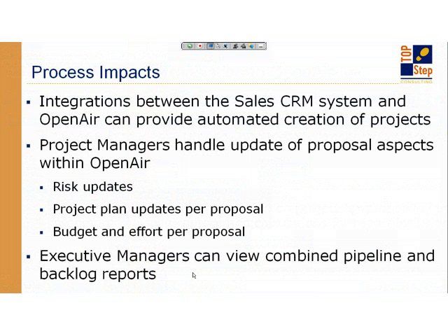However, you also want to take into consideration how much control that integration has. There potentially are quite a few updates going on in your sales system that you may not necessarily want those types of updates into OpenAir. You certainly don't want things like the sales system to potentially control what stage the project is in OpenAir, except for the time it first creates it. For initial creation, put it in the proposal stage, but if I move it to active or closed or whatever, don't try to reset it through the sales integration, as an example.